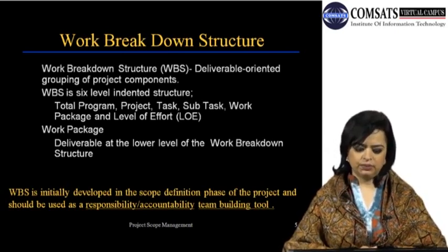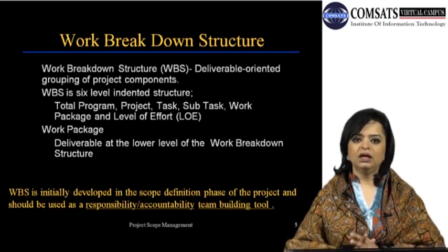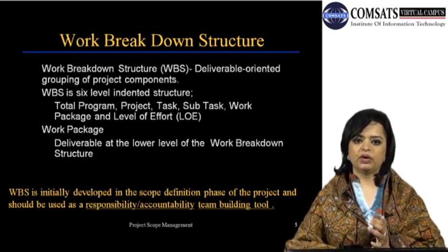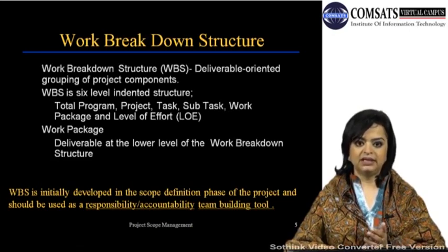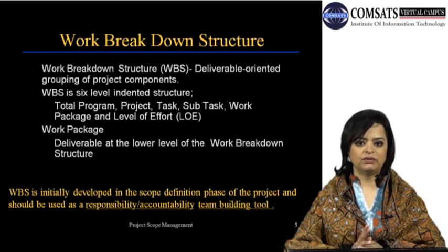Work breakdown structure. It's a deliverable-oriented grouping of project components. WBS is a 6-level indented structure. Starts off with a total program, taken down to project, then the task, subtask, work package, and the level of effort.